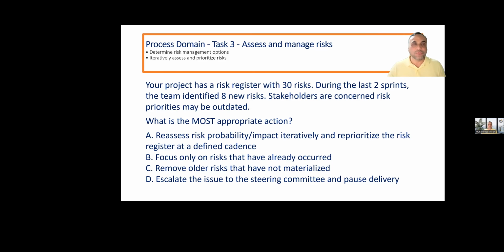You should know that when we are discussing the topic assess and manage risk, risk is a future event which has not occurred yet, because if it has occurred, it will become an issue. Risk is just an event. Its impact could be positive or negative on the project or its objectives. If it is impacting the project objectives, it will be considered a risk.